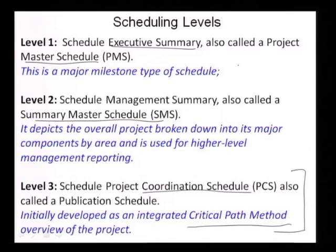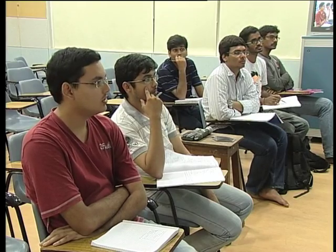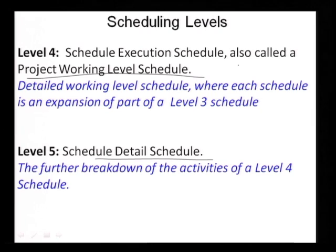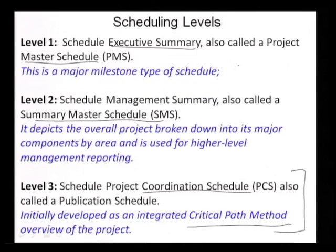Another way to classify these schedules is by how much of a time period you are planning for and how frequently the schedule will change. Level 1 ideally should not change. Level 2 might change if there are major changes. Level 3 has more chance of changing than level 2, depending on major changes in project requirements or unforeseen circumstances. Level 4 and level 5 can change at a monthly level. If you make a level 3 schedule with level 4 detail, you are asking for trouble, because it is going to change so much that just changing the schedule will be your full time job.